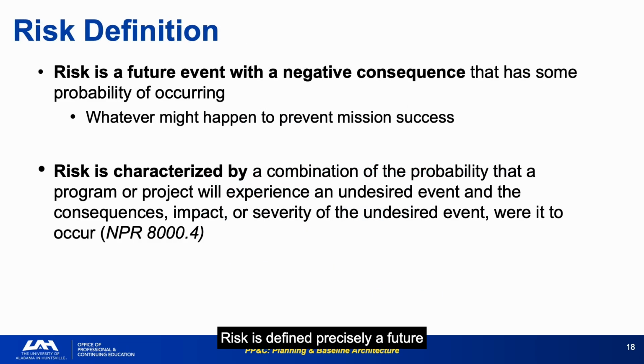Risk is defined precisely: a future event with some probability of occurring that has negative consequences. The definition is important because it distinguishes risk, future, uncertain, from problem, present, certain. My emphasis on some probability, not a certainty, is the conceptual line that separates risk management from crisis management. When the probability reaches 100%, you are not managing risk. You are managing a problem that has already occurred.